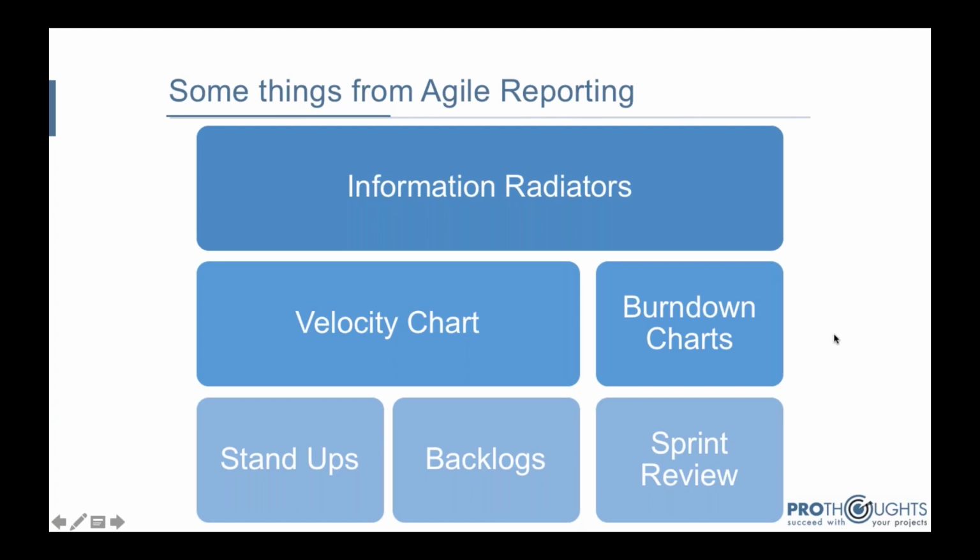One of the key elements of how the project is doing is velocity. Velocity in Agile is the amount of work done in a sprint. A sprint is a small project, or an iteration. It can be from 2 weeks to 4 weeks generally. So how much work will you do in that sprint? Work can be represented in Agile by story points. So they actually chart whether my work is increasing over a period of time, decreasing, or maintaining a constant. So this is a good chart to understand.